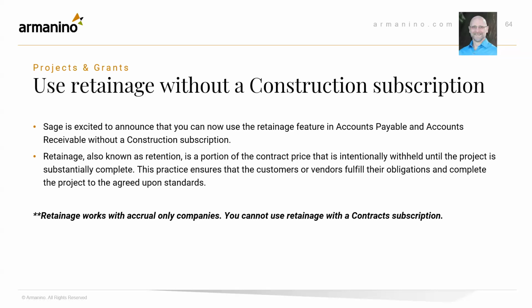Use retainage without a construction subscription. This is kind of cool because it has nothing to do with construction, actually. It's in projects and grants now. If you want to track retainage without necessarily all the bells and whistles of construction, so if you've got project costing and billing, you can now leverage retainage features in both AP and AR.